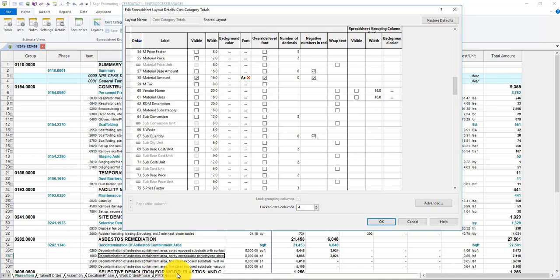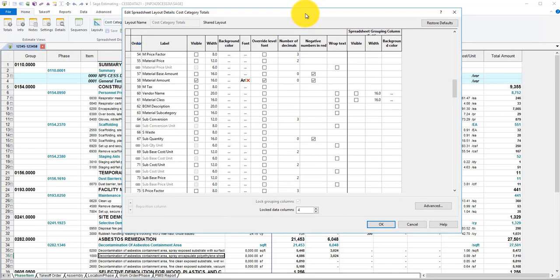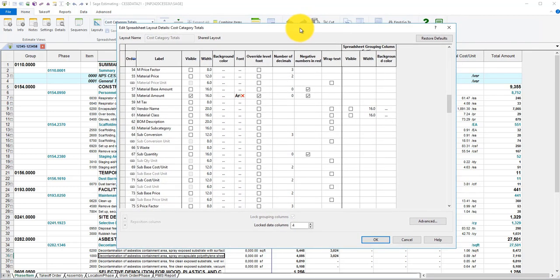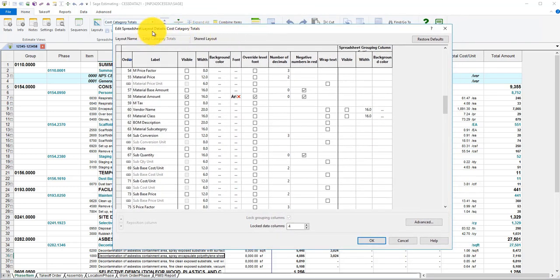And different and new in CESS 2.0 is the fact that every layout now works with every sequence tab. You no longer have to build a layout for every sequence tab that you built. The groupings change based on your selections of sequence tabs, and you can pick any layout now to work with any grouping. We'll cover this in depth in CESS Overview 206.